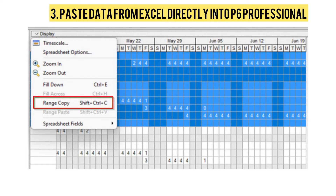The third new feature is pasting data from Excel directly into P6 Professional. We were facing the problem of importing data from Excel to P6, and version 23.12 has fixed these bugs. You can paste data from Microsoft Excel directly into P6 Professional spreadsheet cells. For example, when planning future resource assignments, you can use the Range Paste item on the right-click context menu to paste data copied from an Excel sheet into selected P6 Professional spreadsheet cells. You can also copy multiple cells from a P6 Professional spreadsheet using the Range Copy item and paste those cells into Microsoft Excel, or vice versa.